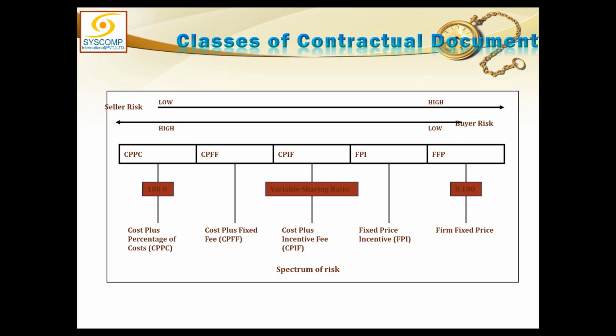So he would just like to linger the project. If extra cost is being spent, he is not really bothered because you are paying it. But he is only concerned about one thing, and that is his fee at the end of the work. So here you are more at risk than the contractor.